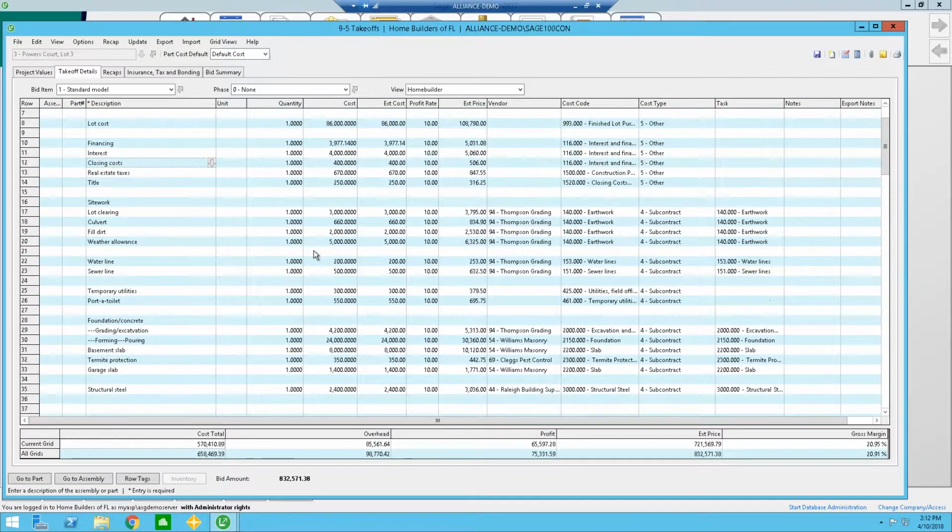So a lot of this is lump sum amounts that I've plugged in. I've gotten bids from different subcontractors and I've dropped those amounts in. So this is the place where I can organize all of this, come up with what the cost of this home is going to be, then begin to tie it to who am I going to issue that subcontract to? Where should this cost end up on my budget so I can then compare my actual cost against that budget.